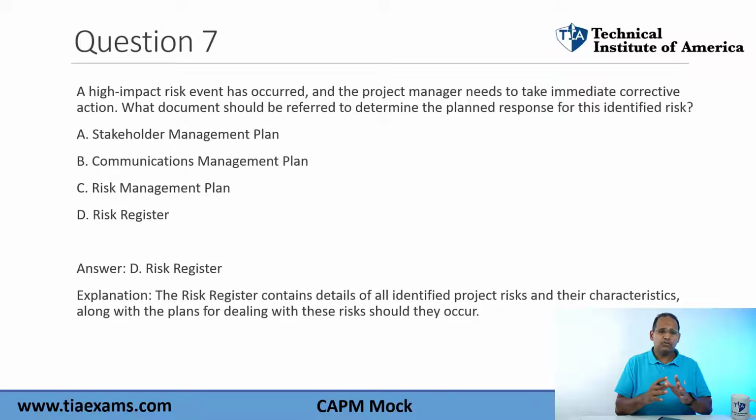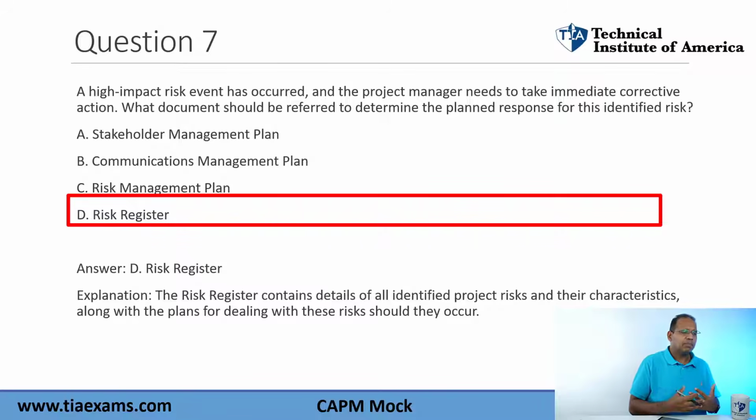Now, you have to understand a couple of things, okay? When you study your process group practice guide, or your PMBOK, whatever you're studying, you go through my course, I keep telling you guys, these management plans don't really have particular things in them. They're all how-to documents. The listing of all the risk and their corresponding plan response or potential responses is in the risk register.